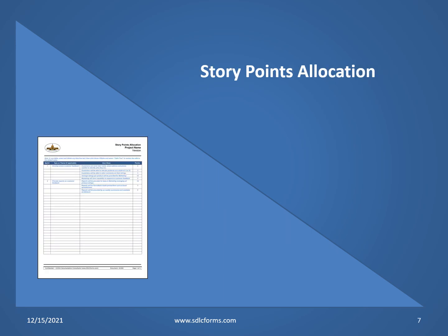A user story is a particular business need assigned to the software development team. Using estimations of story points rather than time allows development teams to be less precise, where a story point is a metric used to estimate the difficulty of implementing a given story.